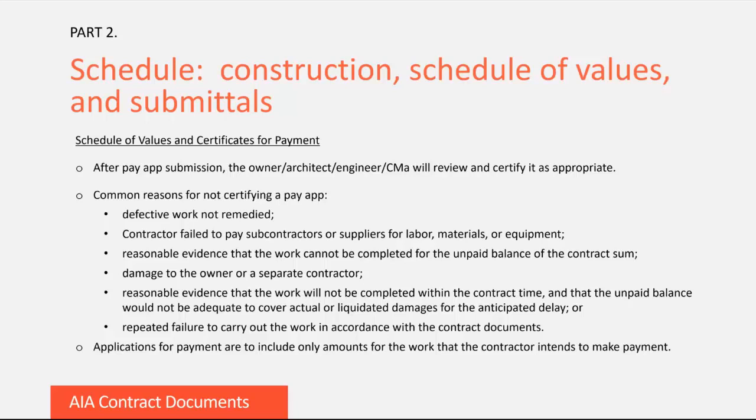Applications for payment are to include only amounts for the work that the contractor intends to make payment. So if you're not intending to pay a subcontractor or material supplier, don't include their invoiced amount on the pay app.